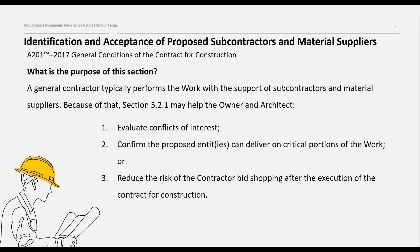It may also reduce the risk of contractor bid shopping after the execution of the contract for construction. As a reminder, bid shopping is generally described as the unethical practice of sharing a subcontractor's bid to another subcontractor with the hope that the other subcontractor will perform the same work for a lower price.